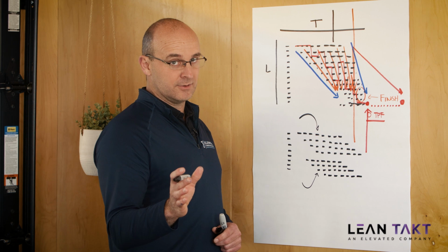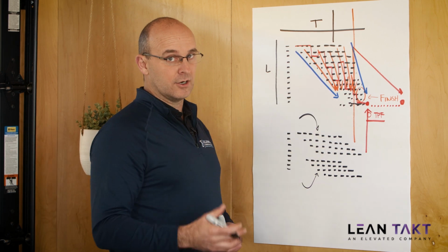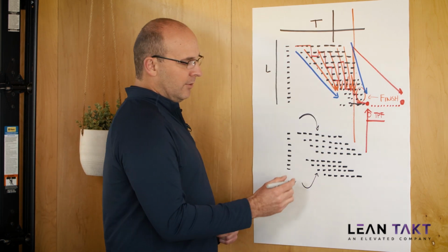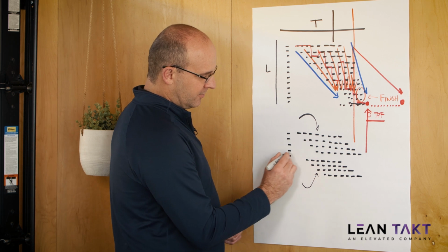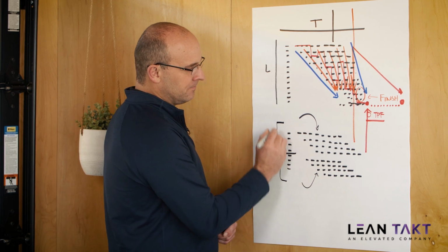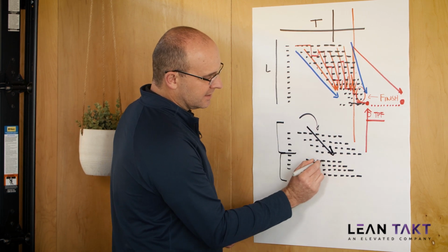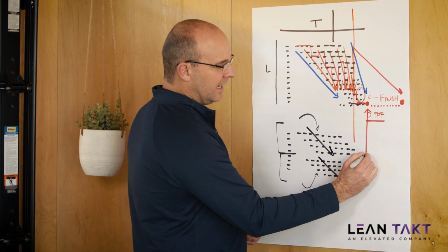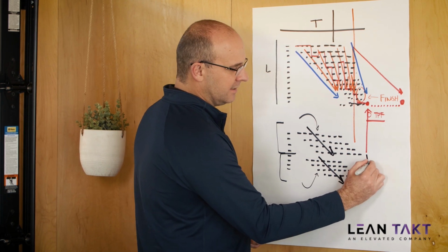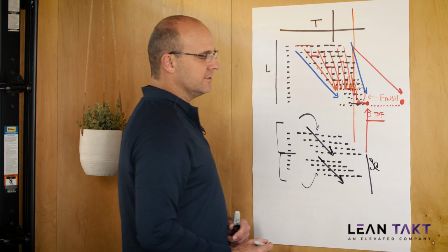And that was possible because in this scenario they had large batched crews. And we aligned material procurement to both of these general phases, and we allowed the trades to keep their diagonal rhythm and to target a proper end date for their substantial completion.